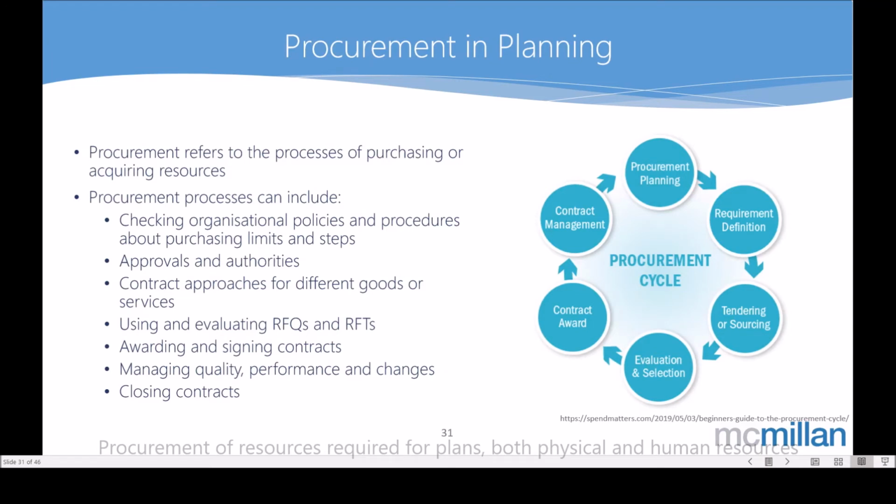And in most organizations, there'll be procurement processes in place. So if that's the case with your organization, make sure that, as part of the planning process, you're familiar with the procurement process so that you work in line with that, so that it doesn't create some type of obstacle or barrier for you as you're going through because you haven't considered some critical step in the procurement process and it's going to push back your time an extra 3 weeks or something. And procurement, for those who aren't familiar, really refers to the process of purchasing or acquiring resources.